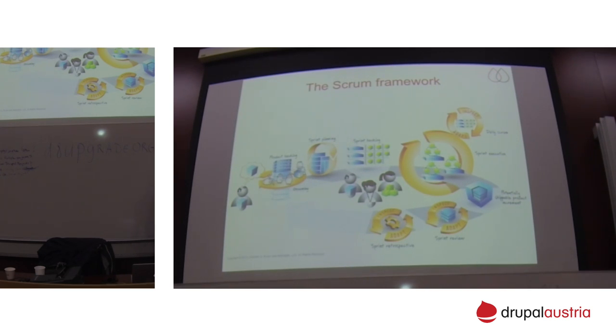We tried with a 2-week sprint. It seemed too extensive because at the beginning, in the first week, at least one of the days is spent in planning. And then if you have the demo at the end of the second week, you're receiving something like 8 days of development, and you cannot do a lot of things.